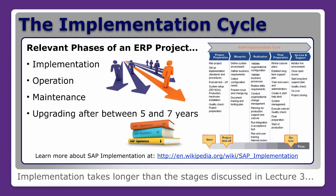In the final preparation phase you refine your cutover plans to ensure everything will go well when you go live — when you tell employees and customers the system is ready for prime time. You establish a long-term support plan, train end users and administrators — either by training super users or training-the-trainer — create and staff a help desk, manage the system, execute cutover, and then the system goes live.